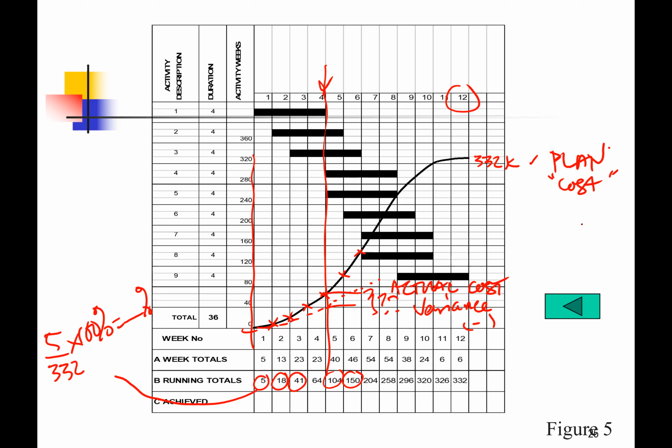In this situation, you are spending less than what you are supposed to, which simply means you are running behind. When you are running behind, what shall you do? You need to speed up. Speeding up is the topic that we already covered in project time-cost trade-off.